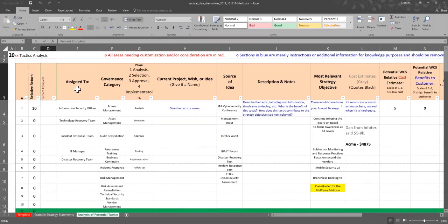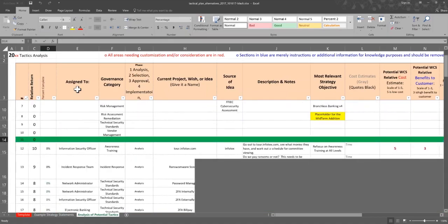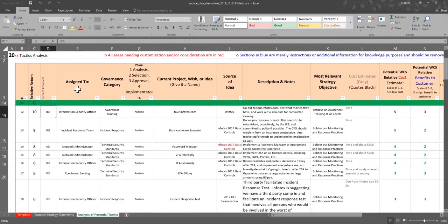Percent completion is just simply how we can demonstrate to our auditors, if we're saying as every time we have a steering committee meeting, that we are actually going in and talking about the tactics that made it into the final plan. Because what should happen is that if we're having monthly steering committees after January, this should say 10%. After February, it might say 30%. Then we kind of lose our way, and here we are in October and it's still 30%, right?